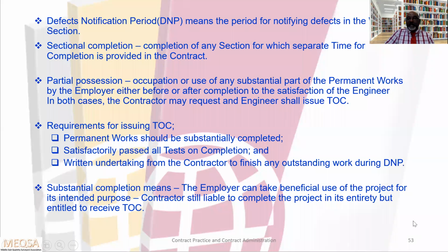Substantial completion means the employer can take beneficial use of the project for its intended purpose. The contractor is still liable to complete the project in its entirety but is entitled to receive the TOC. So this is the meaning of substantial completion.